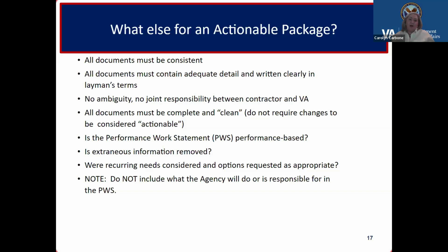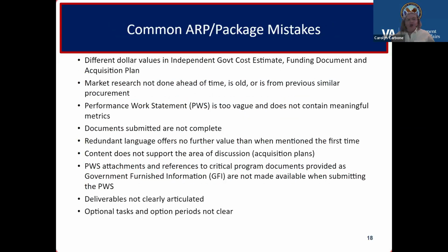So these next two slides, I'm not really going to go through. These are just more takeaway slides. This is really to help you take back to your desk, the best practices in terms of submitting a package that will be as close to ready to solicit as possible. So you can go over those. And again, these are just some of the mistakes that we see. Really, I would say just ensure consistency throughout the documents that you're submitting. Make sure that your IGCE aligns with the performance work statement and the other supporting documents, because that can save a lot of time as well.